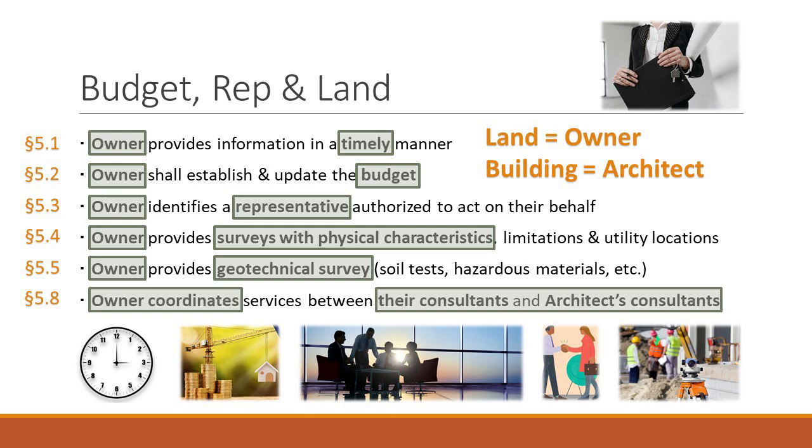And sometimes, when you enter into the contract with your kitchen designer, because of this provision, you say, kitchen designer, you need to make sure that you're fully coordinated with the architect, and if you can't or don't do that, you have to give notice to the architect and me, and if you fail to properly coordinate, it's your cost and responsibility.